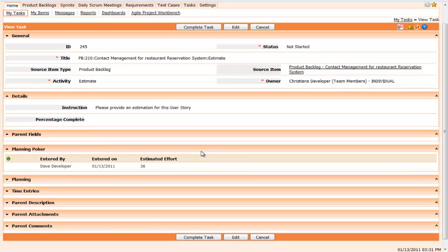Now, I know that sometimes for planning poker, it is customary that each of the teammates should not be able to see other people's estimation. As a matter of fact, that was the original planning poker design. But later it was found that if we do that, often people put estimations which are drastically different. Maybe somebody puts 10 hours, another person puts 100 hours. And often it becomes very difficult for the Scrum Master to reconcile all of these different arbitrary numbers.